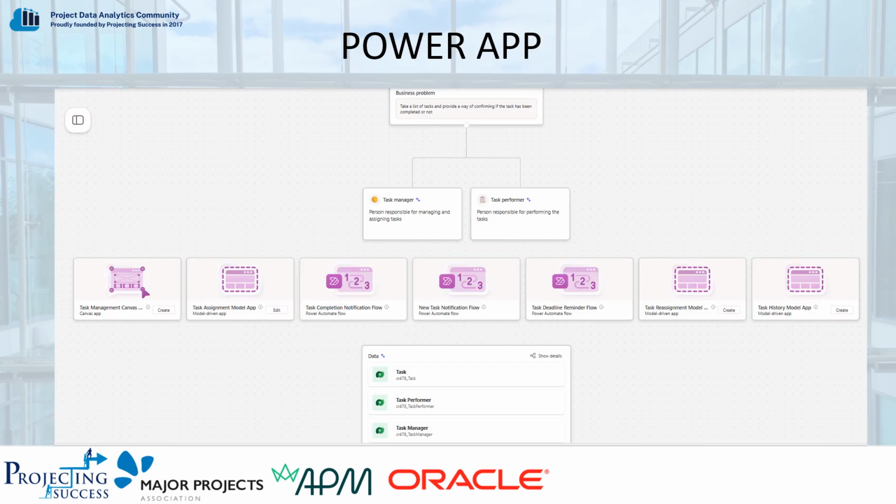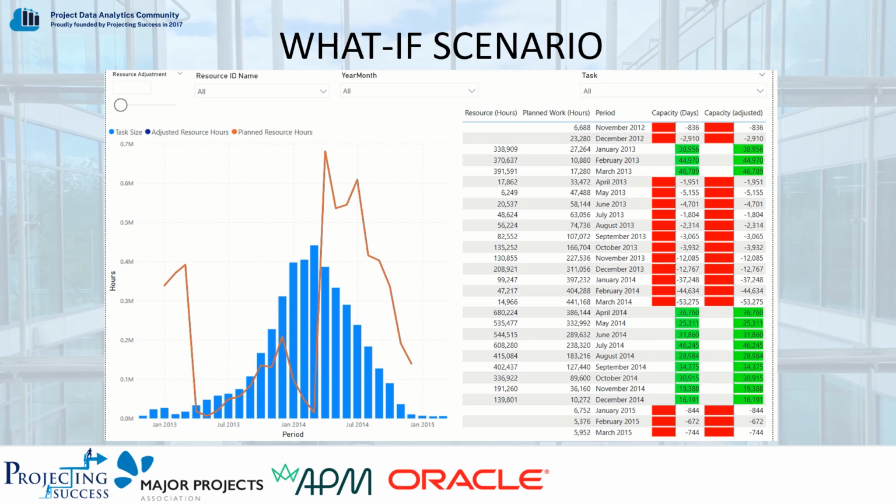This app will allow the resources to update the task completion on a percentage basis from 0, 25, 50, 75 and 100 on a daily basis. Depending on how the task is, this will indicate whether there are enough hours to complete the job in the time allowed or whether the task will slip or complete early. By downloading an updated CSV file on a periodic basis, the master Primavera schedule will then be updated, providing additional functionality to the scheduler.